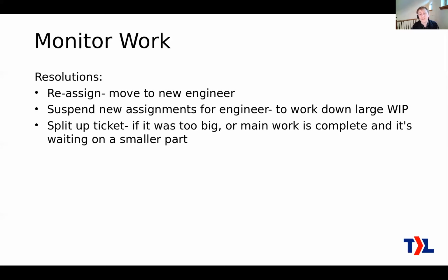Sometimes you can split up a ticket. If an engineer is working on a ticket, and it turns out that the estimate was optimistic and it's actually more work than you thought, sometimes it helps to consider the work that you've done. Even once you've started it, if it makes sense, you can split that ticket into two tickets, especially if the main work is complete, but for some reason you have to wait on a smaller part of that work.